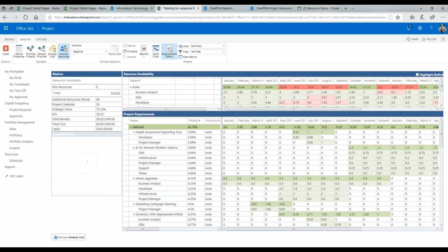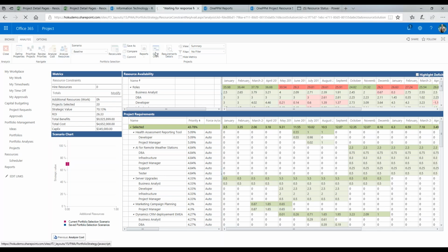And here by the different roles, we can see where our constraints are or where we're overtaxed on these different resource roles, because on each of these individual projects down below here, we have some role-based allocations that were entered in our planning process that we'd done prior. Now, given that, if we go back to our Gantt chart, we can do hypotheticals.